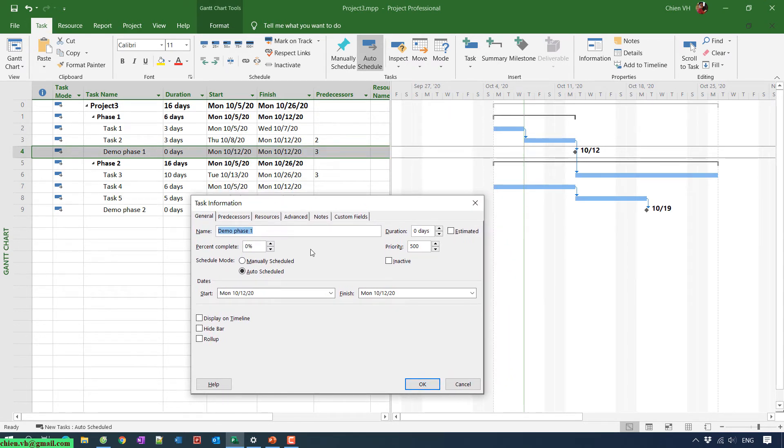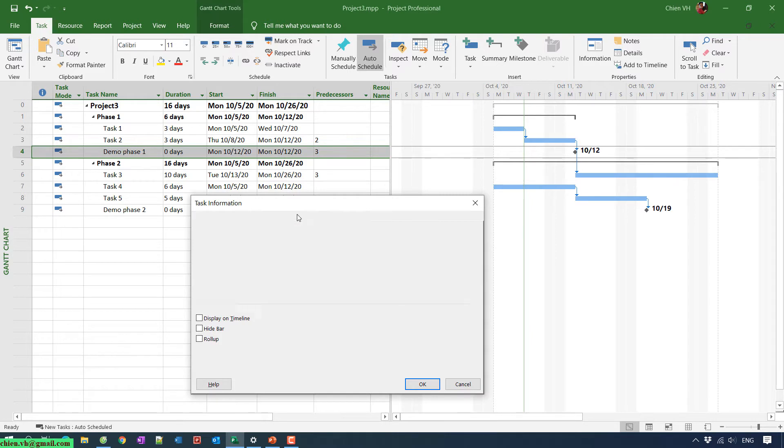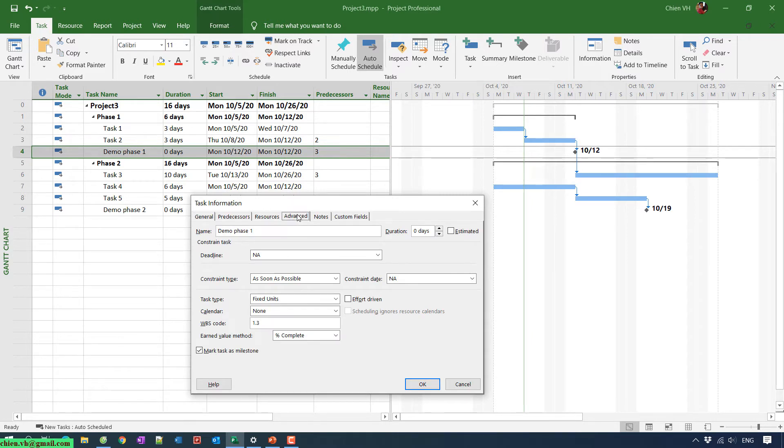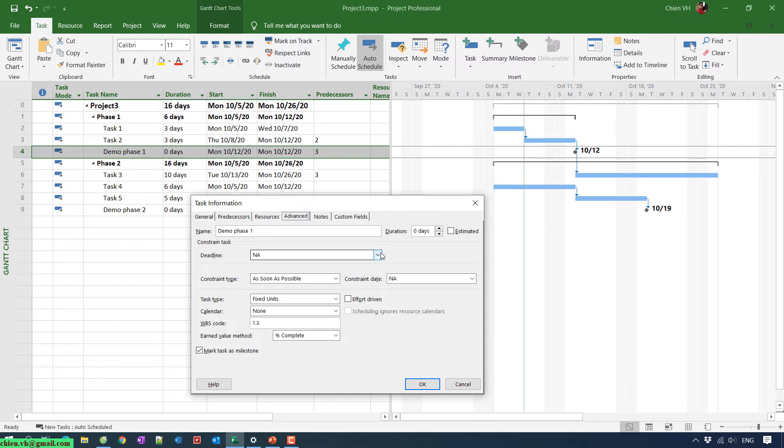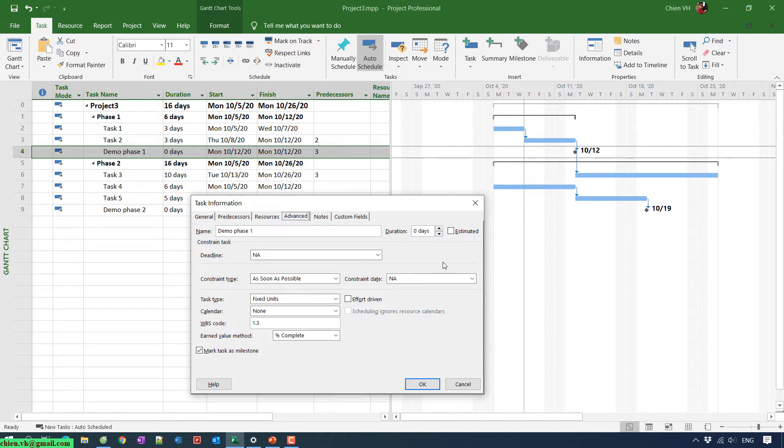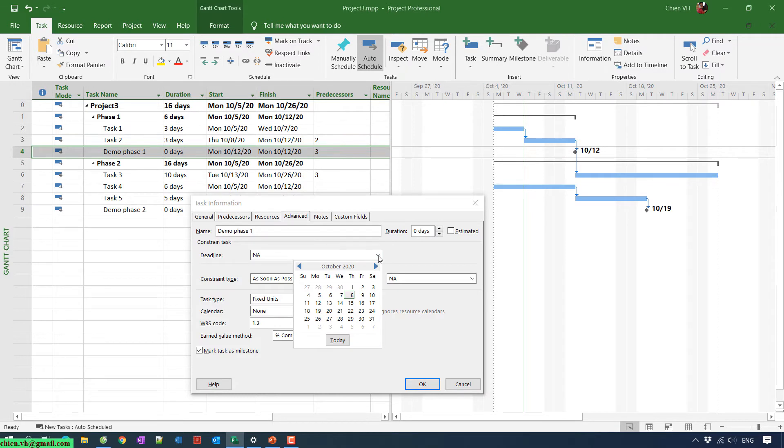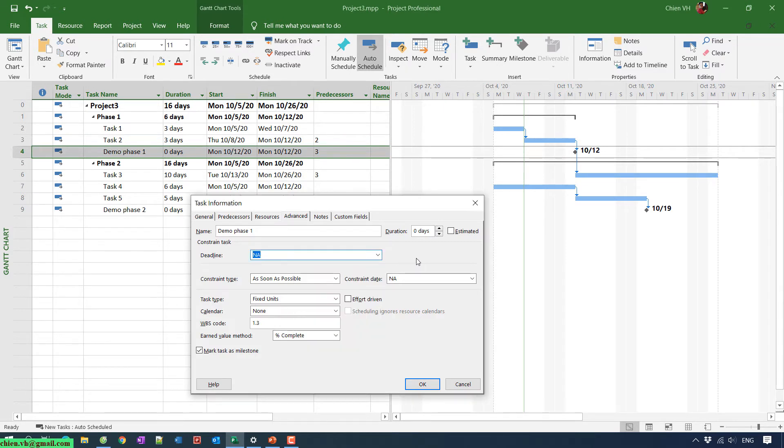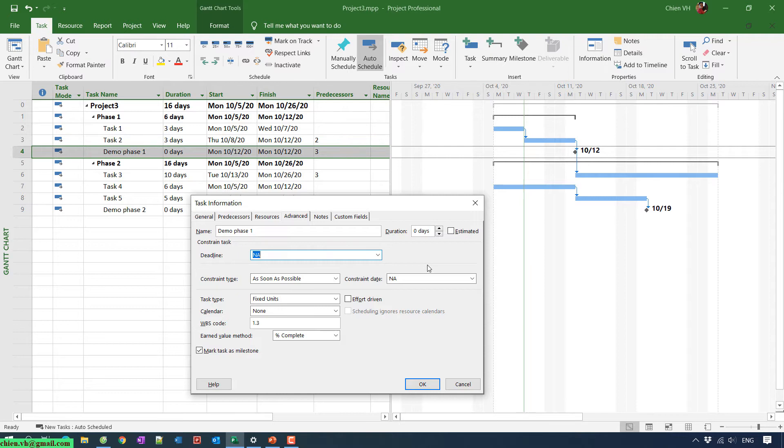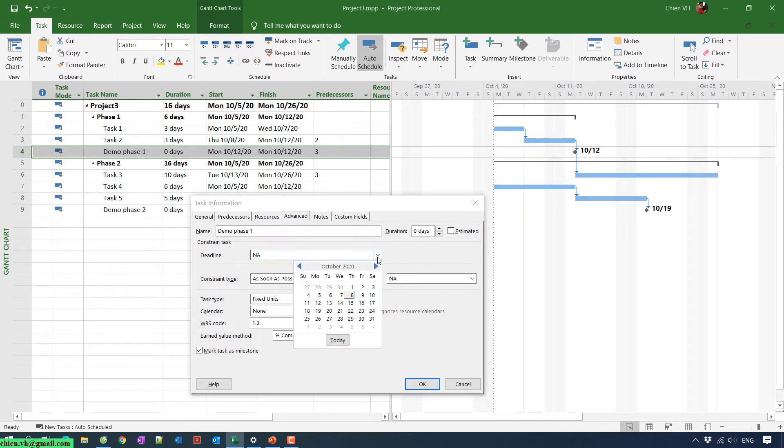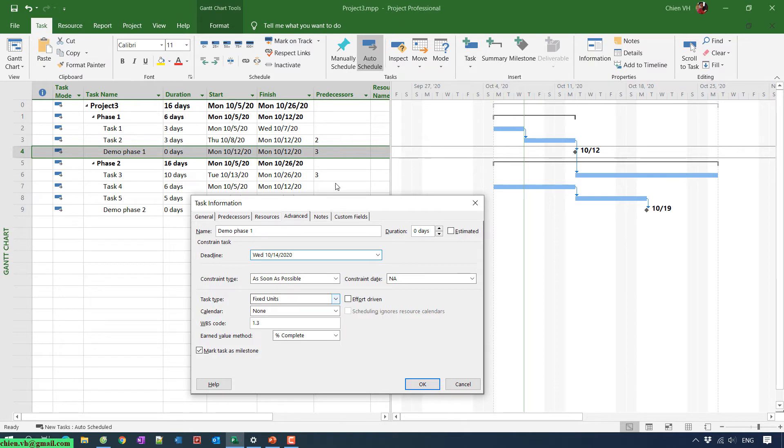Go to the Advanced tab here. In the Advanced tab you have a constraint task, you have the deadline here. In the deadline, we have by default it will set to Not Available or you can call it N/A. So I will go ahead to add the new date for this one. Basically here you see that it will be finished on 12th October, so I will add two more days for this task. It should be the 14th October. Click on the OK button.